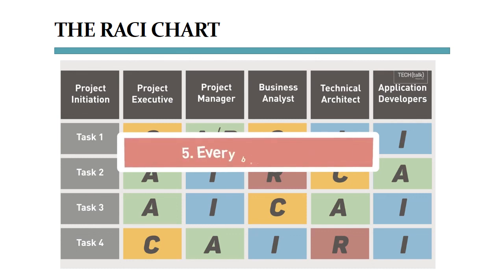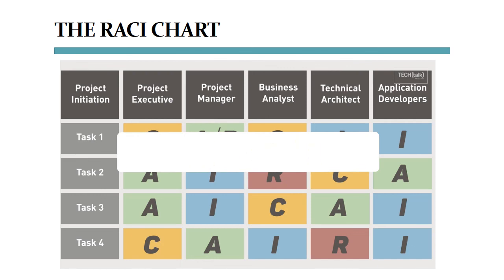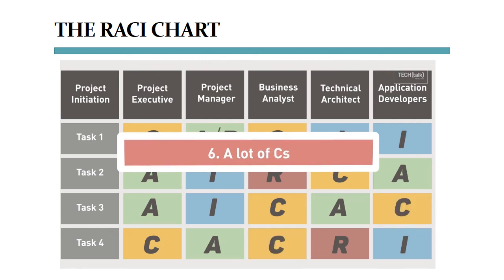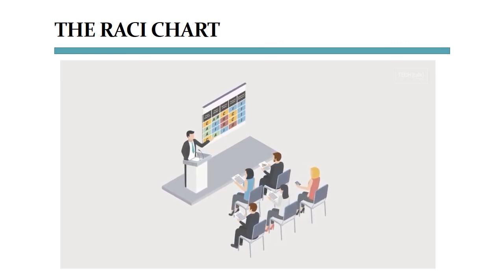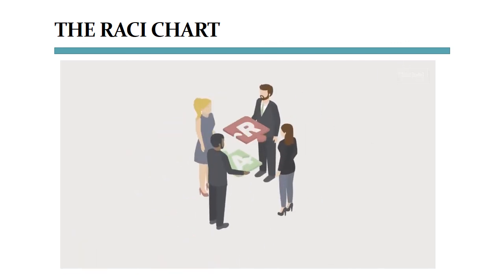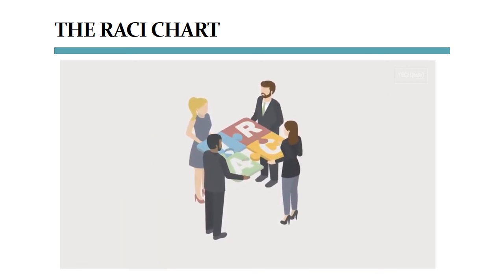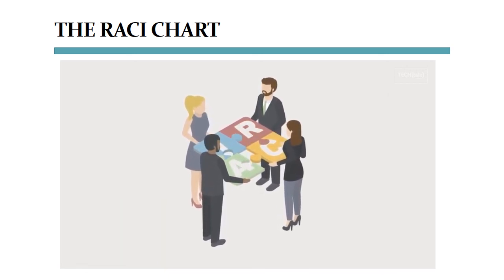Look carefully. Do all the stakeholders involved in each step really need to be involved? Are there justifiable benefits for involving them? Too many C's really slows down a project. Do all stakeholders need to be routinely consulted, or can they be kept informed? Determining whether all stakeholders are included can be challenging because it is an error of omission. This is often best addressed by a steering committee or a management team. Taking the time to do this analysis delivers the real benefit of the RACI model. It will expose problems with the structure of the project management process before they derail your project.